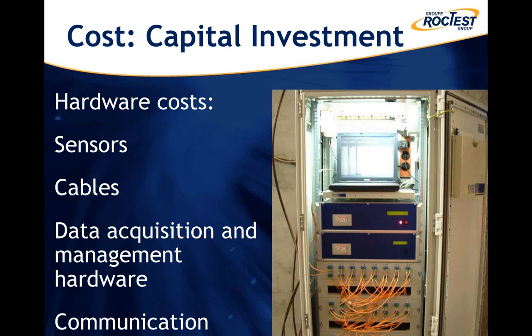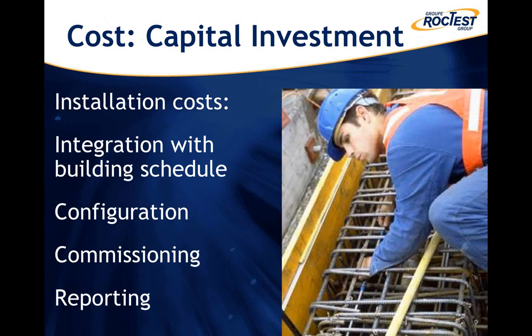And once the system is planned and approved, then you need to install the hardware, such as sensors, cables, data acquisition and management hardware, communication devices, etc. And then those components need to be installed, so there are costs associated with integrating the installation with the building schedule, configuration, commissioning, and reporting about the system installation.